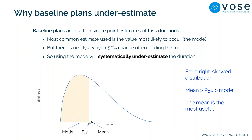Because the distribution is skewed right, the P50 — the value you have a 50% chance of being above or below — always sits above the mode. So if you use your best-guess mode estimate for task duration or cost, you have less than a 50% chance of achieving it, and therefore a greater than 50% chance of going over.